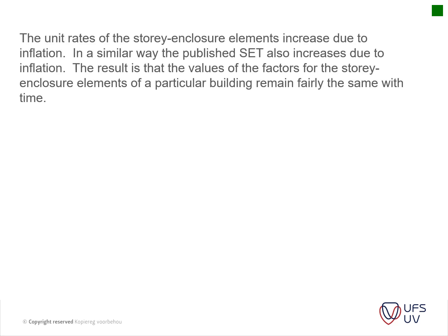Okay, the unit rate of a story enclosure element increases due to inflation. In a similar way, the published tariff also increases due to inflation. The result is that the values of the factors for the story enclosure elements of a particular building remain fairly the same with time. You can also refer to paragraph 1.11.1 of your chapter D. This is what we discussed last week, which I've been referring to during these examples.